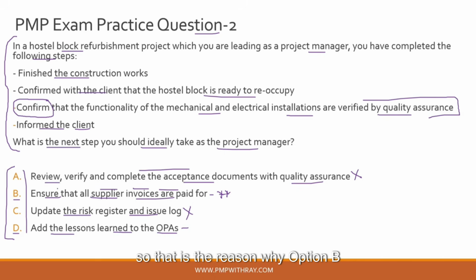Okay, so that is the reason why option B is also incorrect, and the correct answer to this question is option D, which is to add the lessons learned of the project to your organizational process assets.